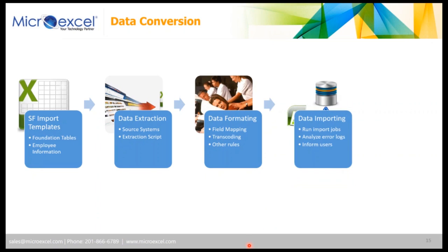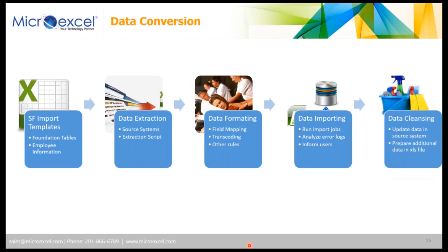Then of course the data importing side, where we will be loading all the data, analyzing error logs, and then informing the users. That goes into the data cleansing mode, where you need to update the data in the source system. When the data is present in the source system, it's always better to update it there, but sometimes I don't even have the data. Let's say I don't have a good structure for job codes, levels, cost centers, whatever. So I may have to prepare additional data in an Excel file, which I will then use.